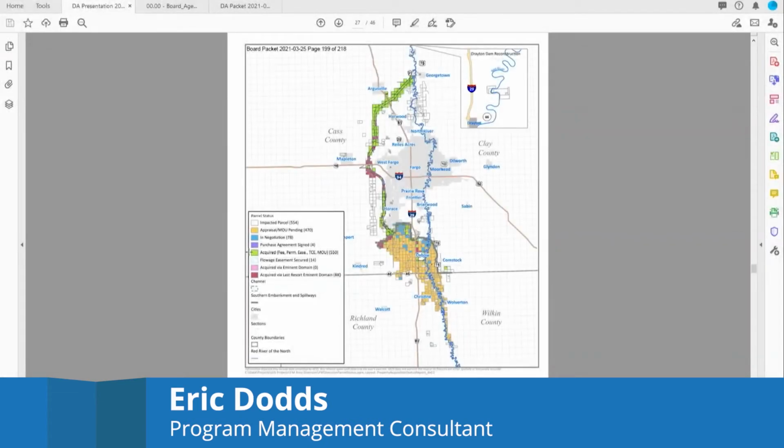We do have a number of parcels that are still in an eminent domain situation, and our legal teams are working on discovery requests and the usual processes along with that. We are continuing to negotiate on a number of parcels, primarily for the Red River control structure and the Drain 27 wetland project, as well as just a few properties in the upstream mitigation area. And then I think I mentioned this last month, but just as a note, all of the orange colored boxes in the upstream area are under the appraisal step that Crown Appraisals is working on the flowage easement for that process right now.